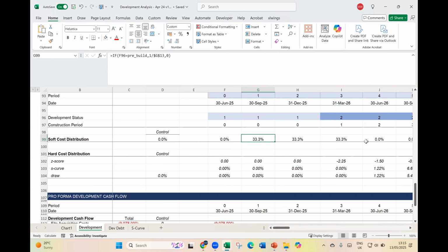So 20% is a straight line. And then for the S curve here, if you have 5 periods, then you don't know what it is. So then what we do here is that we assume a normal distribution. So we use here a function called NORM.DIST to find out what is this normal distribution, the bell-shaped curve.